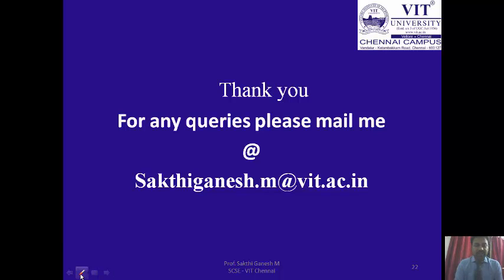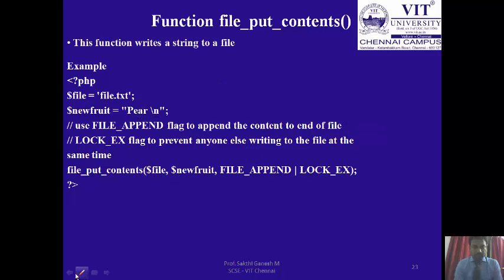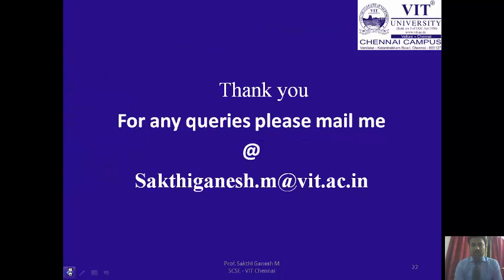This session ends by covering two different approaches to finding the cost estimation: an older approach and a newer approach. The older approach calculates the estimate from lines of code. The newer approach uses many formulas and constant values, dividing the factors into simple, complex, and average, and by finding the adjustment factors, we find the overall cost estimation of the project.